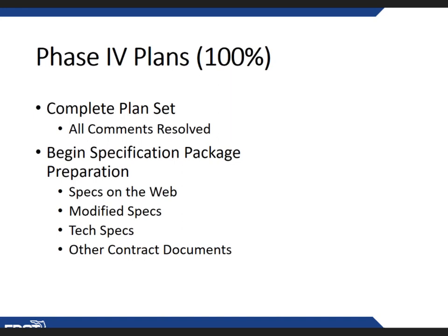It adds unnecessary work. So I'm going to preach this about working your schedule and also drawing that line in the sand about this is when the design stops and your CAD system's down. I'm going to emphasize the package preparation for the specs. That means pull the pieces together. We don't start writing the specifications book at the last moment. We don't start writing the tech specs at this point. We don't start writing the design standards. This is when we pull them together.